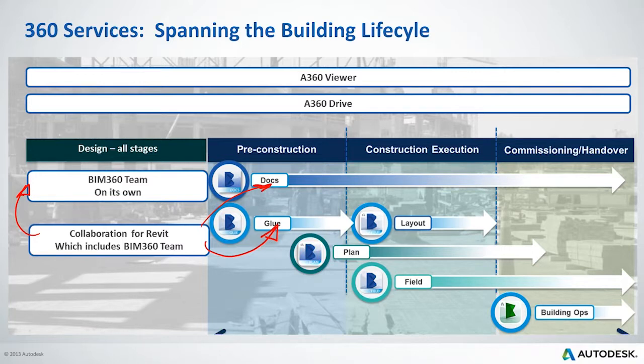There's a really sophisticated data transfer when you have models that go from Glue into Field. So for example, equipment tracking, I want to show a little bit about this today, like some mechanical equipment that came from Revit, followed the workflow to Glue, got coordinated, followed the road all the way down into Field, so that my subcontractor that's installing air handling units installed it, and they updated the status. So the status got updated, and then that can get updated all the way back through each of these models respectively. So there's a real fantastic workflow that really takes place throughout this.